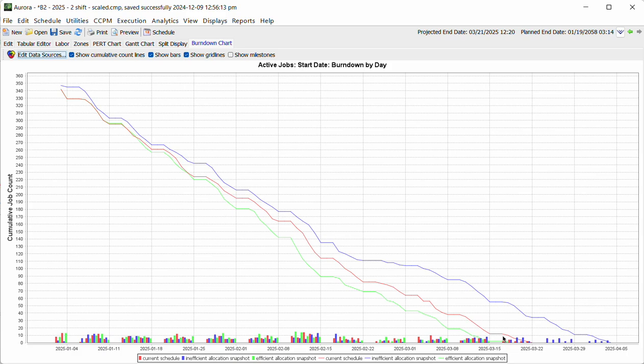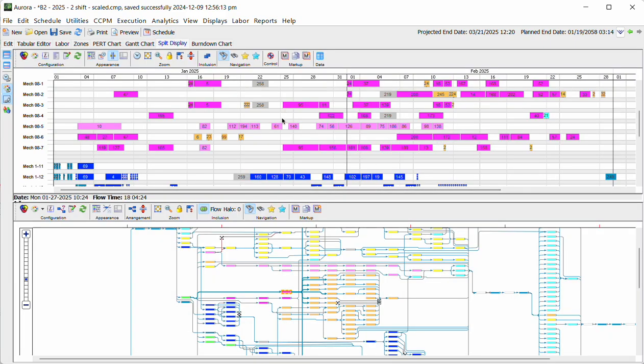Please note that I did a delay of about 2 weeks for that particular activity. The overall project delay is less than a week. And that is because with the dynamic scheduling, we're able to reorder the work and get the remainder of the work done as efficiently as possible.